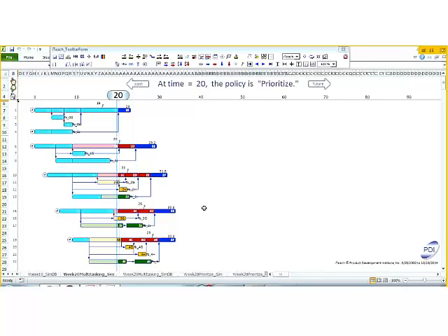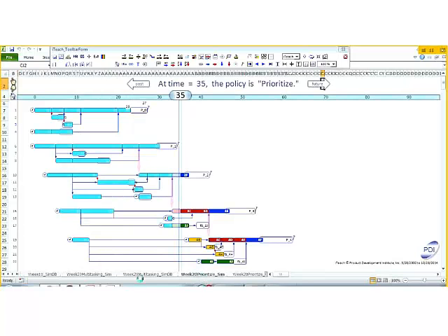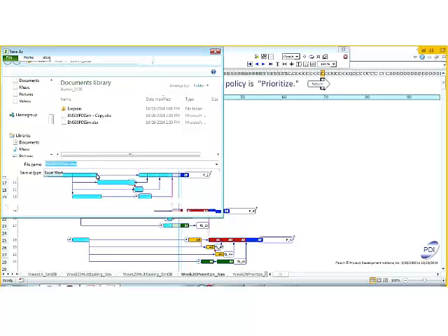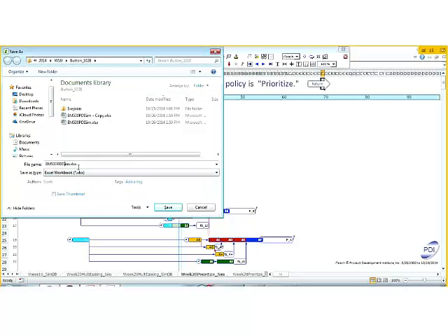So I'll remind you, I think two lectures ago, I gave the overall multi-project approach. Step 1, prioritize the projects. Step 2, schedule each project as a critical chain project. So let's go to week 20. Let me save this under a different name so I can open up week 20. So we'll show that in a second.